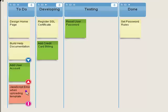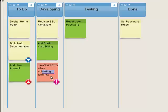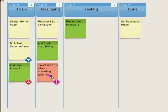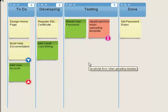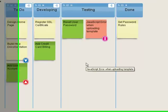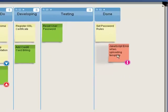Thus, the development team pulls it from the work queue first. When they're complete with the task, our testing team knows they need to test this item before anything else. When they're complete, it moves into our done lane.